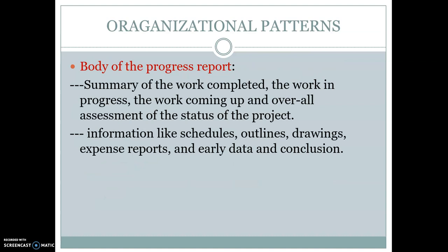The next is body of the progress report. It includes a summary of the work completed, the work in progress, the work coming up, and an overall assessment of the status of the project. It also contains information such as schedules, outlines, drawings, expense reports, and early data and conclusion.